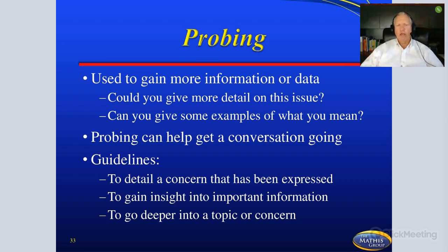What are you doing right now? How fast is it right now? Let's talk about your effectiveness right now. Let's talk about your efficiencies. All of those are kind of gray. The customer has a requirement. They want to be obviously more productive, but you've got to be able to measure where they are compared to where they want to be before you get out of there to be able to come up with that requirement.